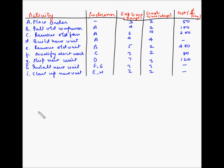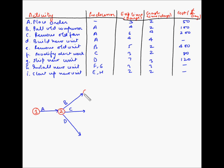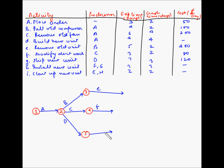First we will draw activity A because it does not have any predecessors. Next, B, C, and D are all dependent on the completion of activity A. So let us draw these three activities. This is B, C, D, and this is A. Let us draw the ending nodes 3, 4, 5. Now E is dependent on B, F is dependent on C, and G is dependent on D. So let us draw these: this is E, this is F, and this is G.